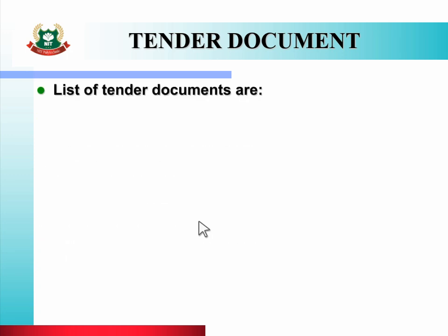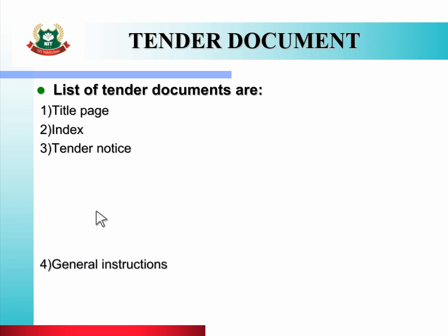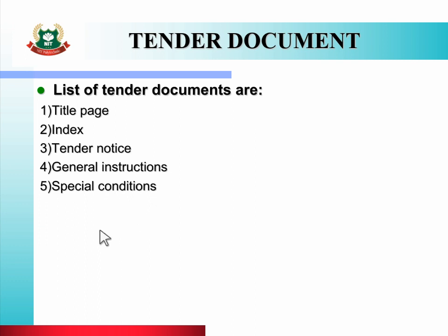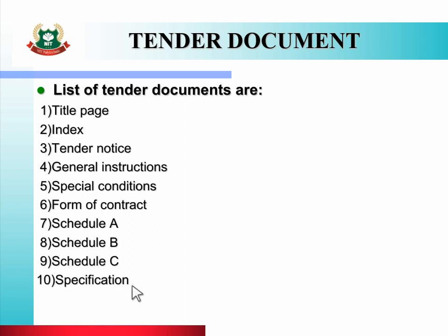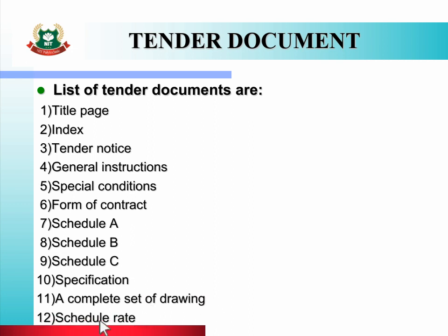The tender document booklet consists of: first, title page; second, index; third, tender notice; fourth, general instructions; fifth, special conditions; sixth, form of contract; seventh, Schedule A; eighth, Schedule B; ninth, Schedule C; tenth, specification; eleventh, a complete set of drawings; and twelfth, schedule rate.